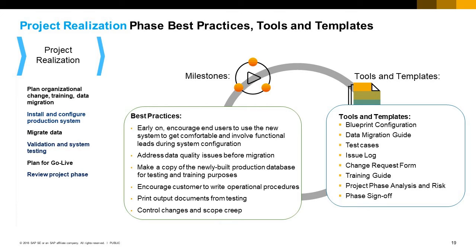Address the issue of data quality and integrity with the customer. Unless otherwise agreed, it is normally the customer's responsibility to clean up the legacy data before migration, and the consultant is only responsible for the actual migration. After you have configured the production system, make a copy of the database, and use this copy for system validation and system testing and for training.